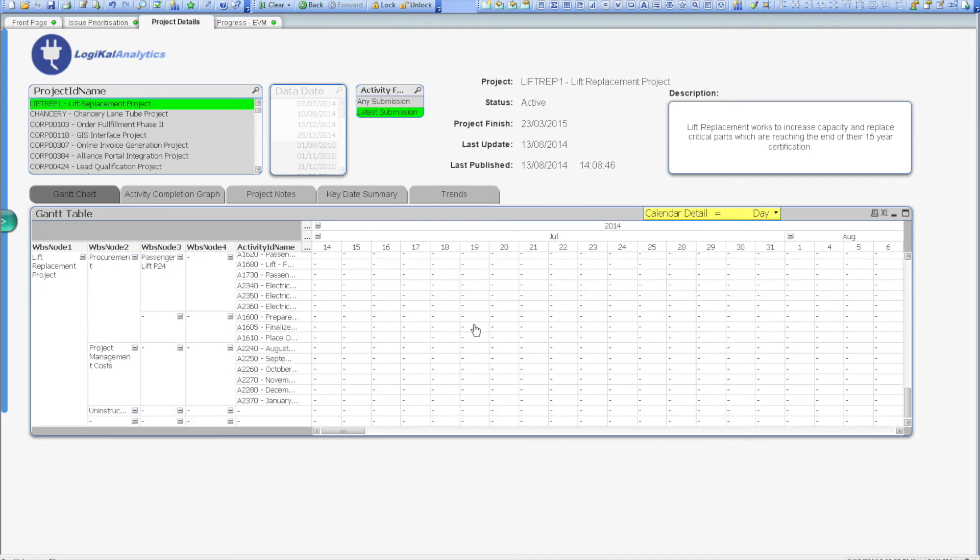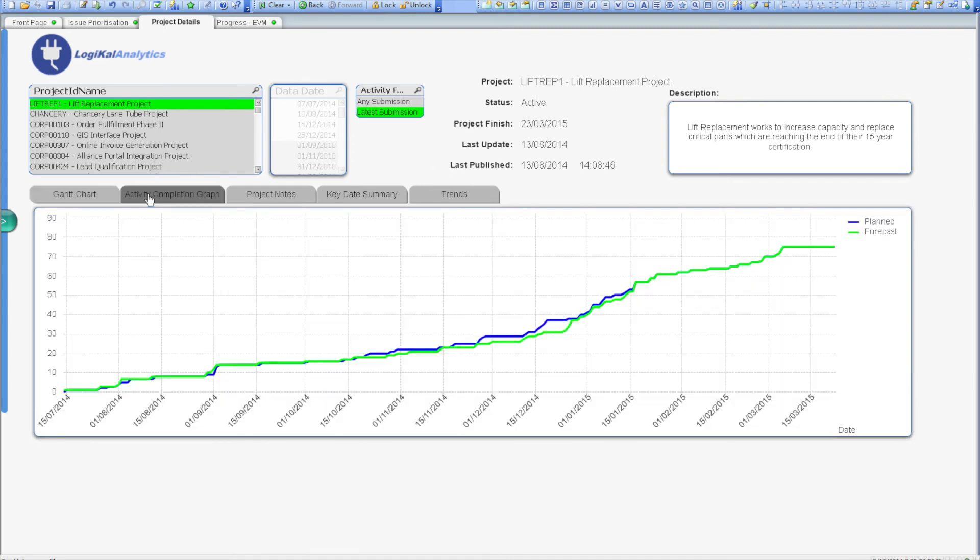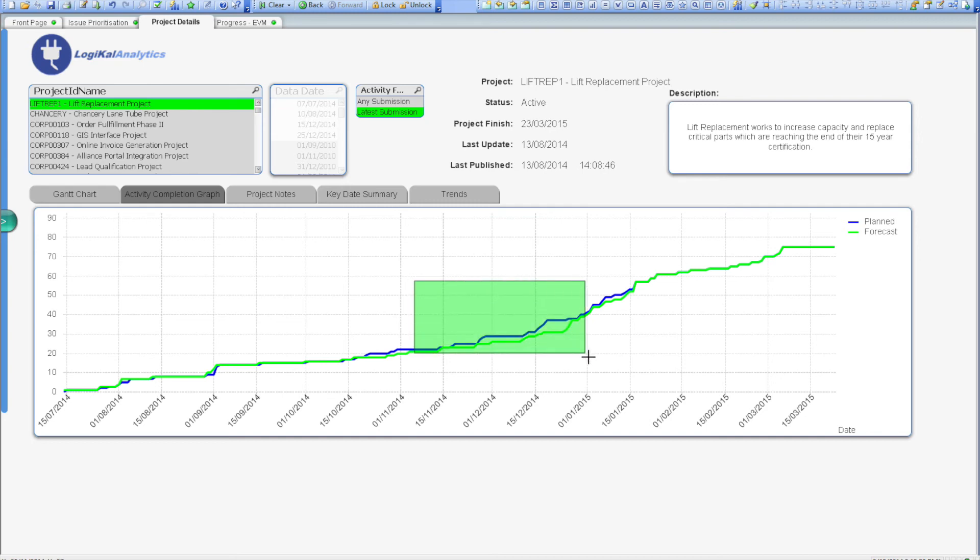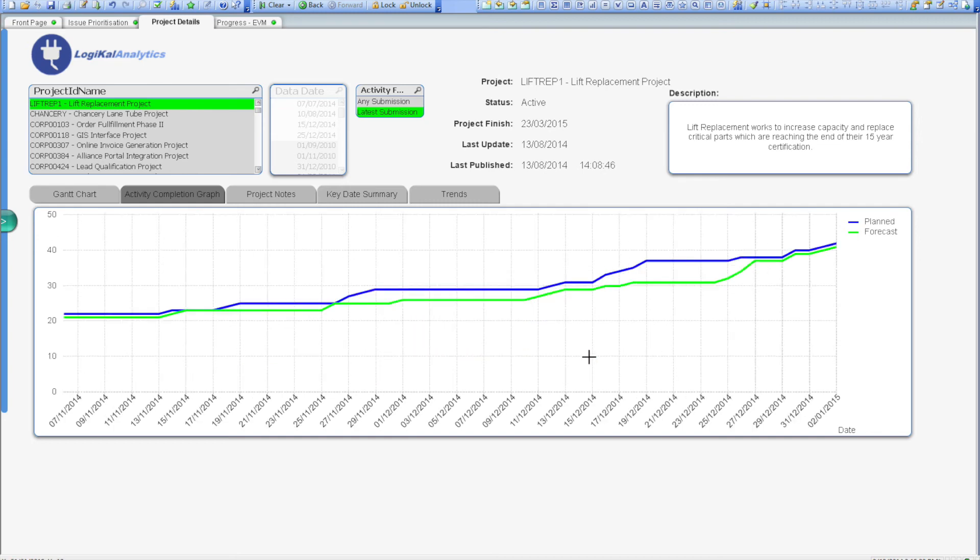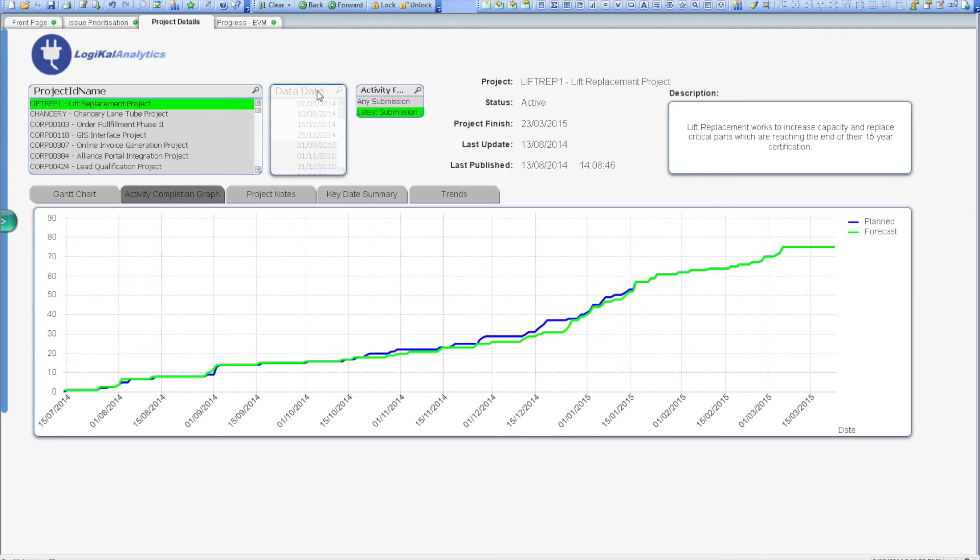It's also possible to view the activity summary through the activity completion chart. This graph shows the baseline plan versus the forecast completion dates. The view gives you a quick way to visually identify if there are slippages within your schedule and to quickly focus in on the specific activities that are affected by the slippage. The view uses no financial or EVM data, and is a good example of how the logical analytics tool is flexible no matter how much information is stored in Primavera.